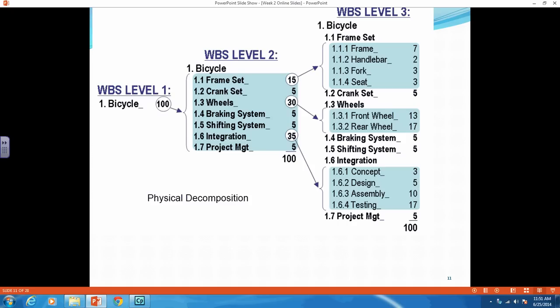For your deck project, your level one will be your deck project. Your level two will be your different deliverables or phases of the deck design and build. You will have a project management deliverable. You will probably have a design deliverable, a layout and plan deliverable.